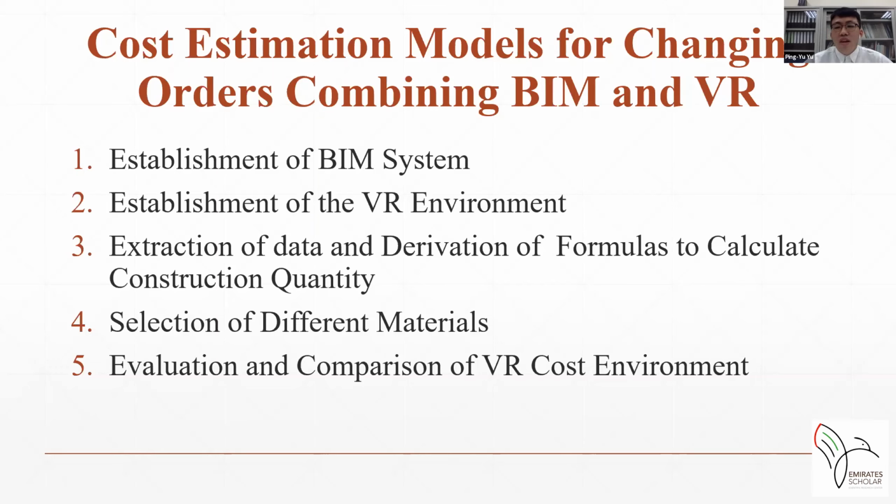Hence, the client can immediately view the results of the application of the selected material. The fifth is the evaluation and comparison of VR custom environments. A database is applied to determine unit price, and the study system uses a BIM database for quantity data. These databases are consulted to calculate the cost of changes.